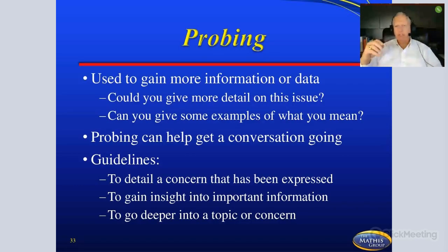The probing questions you will find when your customer has come back with something that's kind of a gray requirement. We want it to be more efficient. We want this to be more effective. Well, obviously, we want speed. All of those sound good to the customer and they mean it. But on your side, if you're trying to do a project that's more efficient, more effective, and speed, what are you measuring to? How fast are you doing?